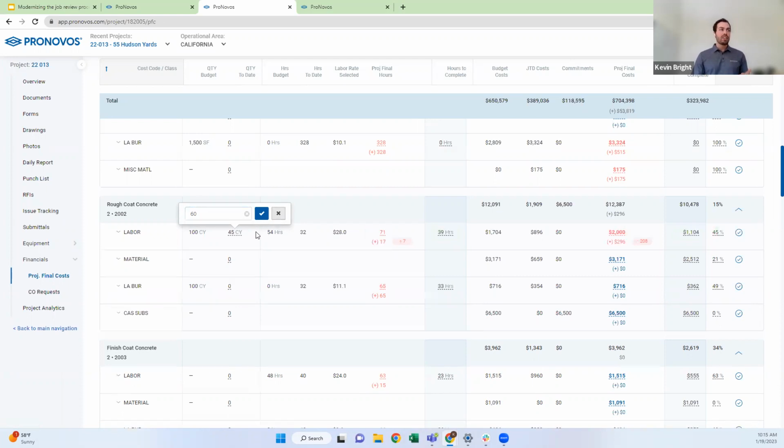And the reason that I think using your quantity complete is the gold standard is twofold. One, it's going to be the most accurate, right? If you're actually counting what you've gotten done on the job site, that's going to be way more accurate than trying to figure out what your costs are. And the second reason is you can start to leverage production rates. When you start using production rates, it really gives you a lot of insight, not only into how you're performing on a job, but also some corrective action you can take.